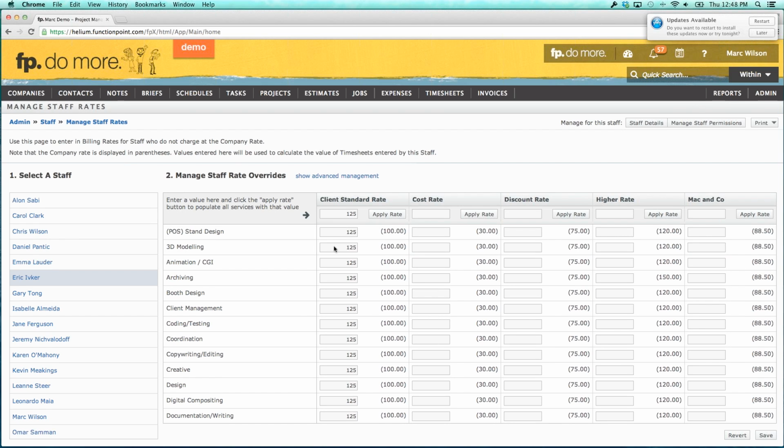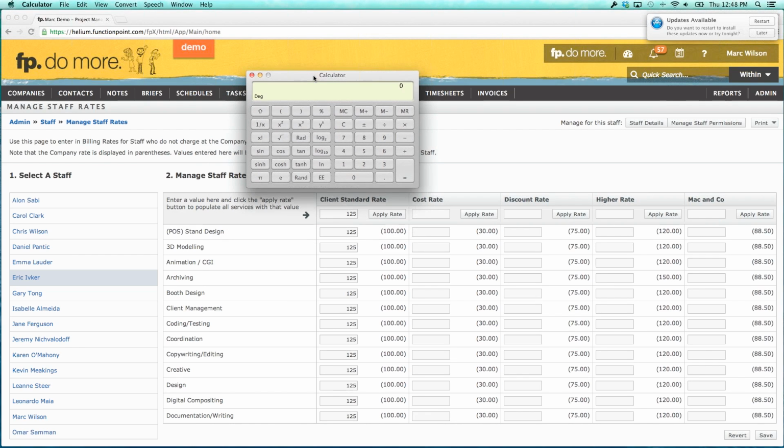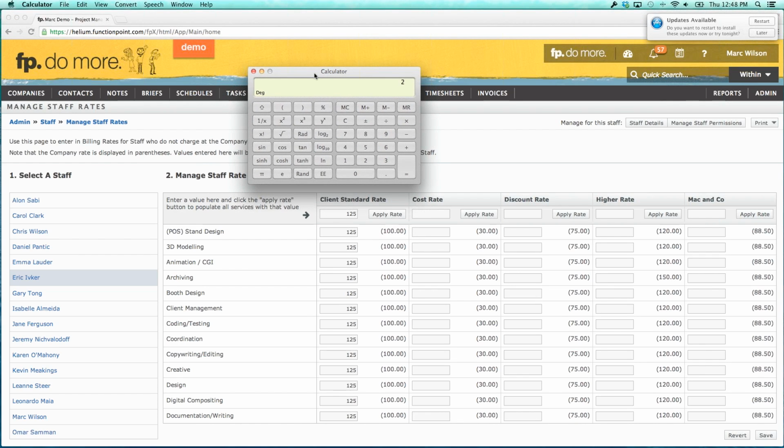Take a staff person's salary, add that percentage of overhead. So if I have $200,000 a year in overhead and I have 20 staff people, then I'm going to take that $10,000, I'm going to add it to a staff person's salary. So let's say, for example, I have someone who's making $50,000 a year. So I had $200,000 in overhead, dividing it by 20 staff, it's $10,000. Staff person's salary is $50,000. So I'm adding $10,000. That's $60,000 as the cost of this staff person.